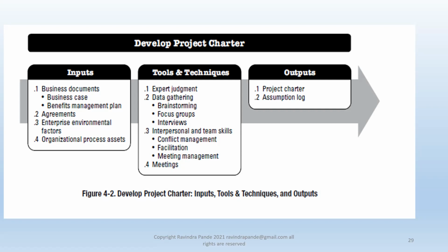These are all cultural challenges we need to address in terms of cultural project assumptions. Or there are assumptions like, okay, this computer will work for all these software. And if you load a couple more software, the computer becomes too slow, so we might need to add another processor, RAM. All such assumptions we need to address and convert into risks, which we review at periodic intervals. And this is how you normally address the develop project charter process.